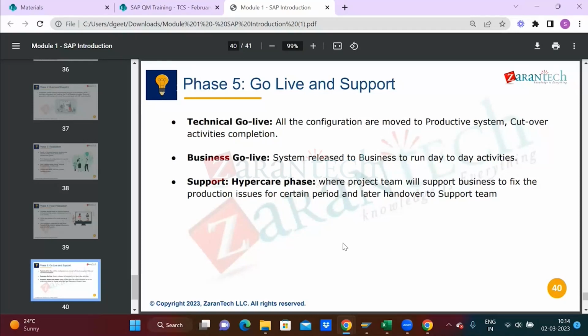In some cases there are spillovers, due to some communication gap with the business or the complexity of the form, and we are unable to deliver the complete set of forms. There will be one or two forms which spill over to the next sprint. Then in the second sprint, instead of 20 forms, we need to deliver 22 forms. Most companies are now involving this sprint approach, but ASAP methodology is still there. The requirement gathering, development, testing, everything now happens in the sprint itself.